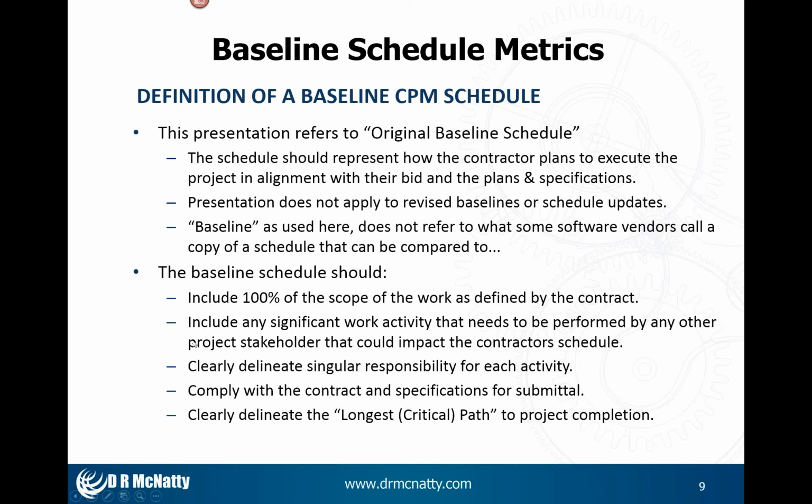Now, another thing that I think is very important in an original baseline, especially for a contractor, is to include any significant work activity that's going to be or needs to be performed by someone else that's involved in the project that could impact the contractor's schedule. So even though this isn't the contractor's work, it could have an impact on it. And my perspective is it's in the contractor's best interest to get visibility on that up front.